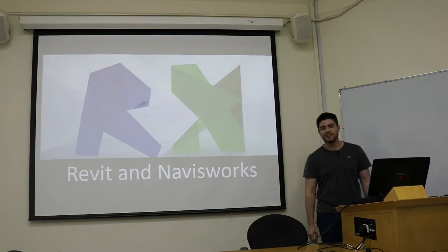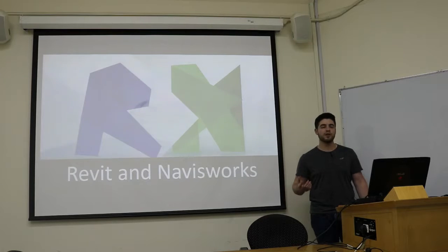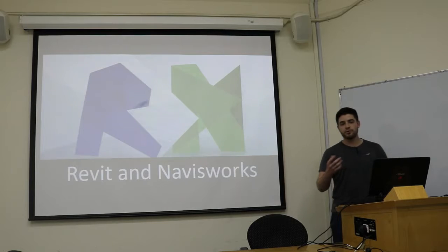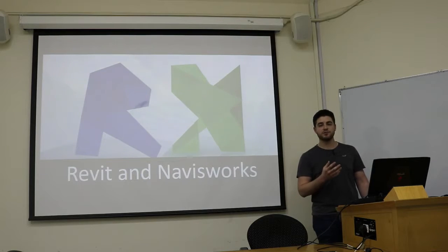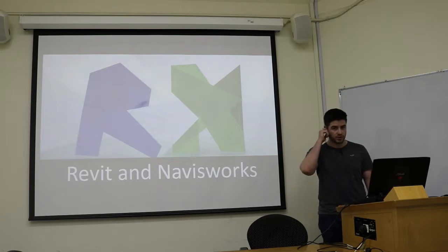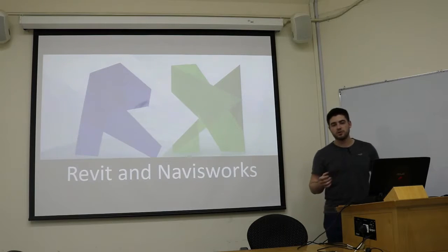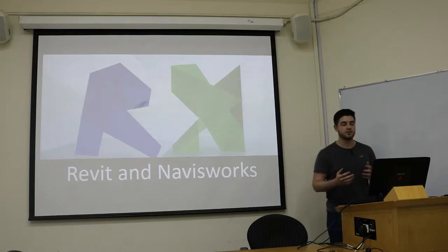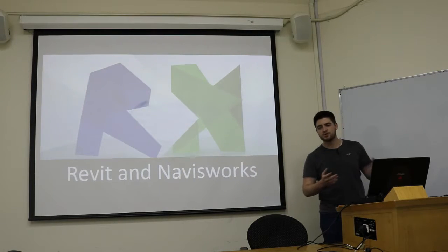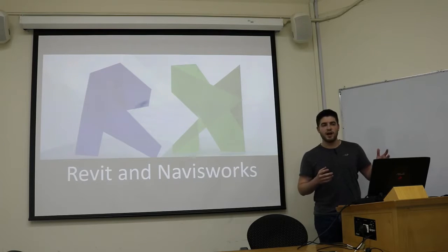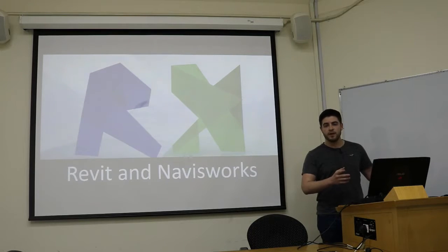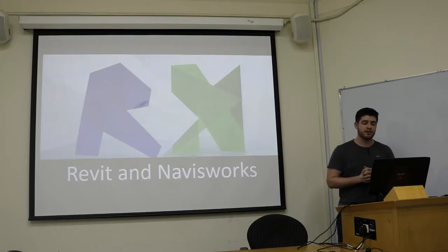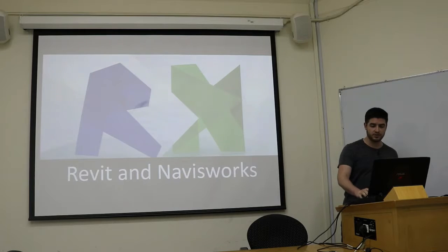Now for this Revit and Navisworks software usage, we will look at them simultaneously, thus showing the process followed through Revit while at the same time looking at the assumptions made with regards to the activity logic. It is important to note that there's a good number of overlap in activity sequence, as most of the time some of these activities will start as soon as possible. So for example, as soon as there are 6 foundations and they've had their time to cure, then the construction on the neck columns will begin. This is done to provide the smallest time frame possible for the project.